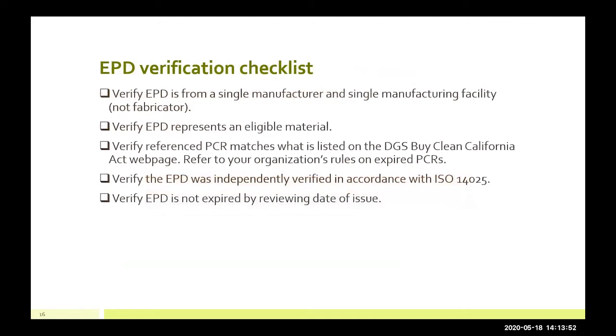This is DGS's simple EPD verification checklist. We have just 5 boxes that we recommend the awarding authorities to check off when you're looking at an EPD. So the first one is to verify that the EPD that is in your hand is from a single manufacturer and a single manufacturing facility. And it can't be from a fabricator.